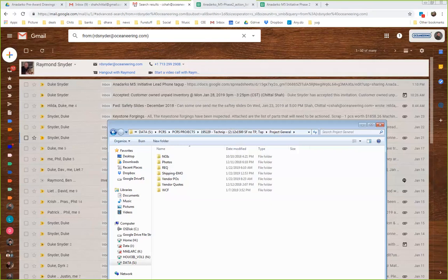Yeah, I like that statement. So I think there's a little bit of a battle between the way we do things and our general manager. His background is supply chain. We're like, why don't we just order it when we need it, like you're asking? But what if it doesn't show up when we need it? Then everything is stopped. I think it's important to have even some smaller things that you can have in the warehouse within a week.